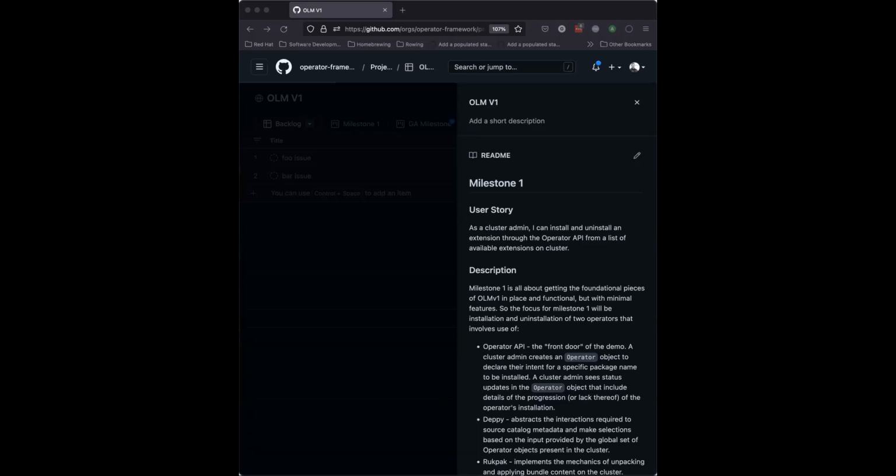I would probably say that maybe we want two sorts of meetings, right? This sort of meeting where we're talking about milestone-level stuff, maybe once a week to start out. But then day-to-day story breakdown within that milestone for Deppy and Ruckpack and Raya and whatever we're working on, right? That maybe should happen more often.